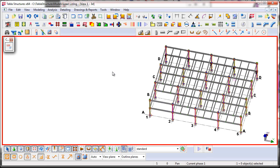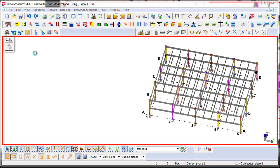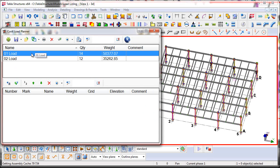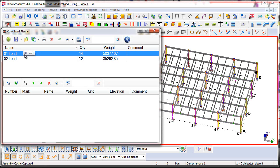We're now here back in the detailing version of the model, and the first step is that I'm going to load the Erector or Project Manager's load information back into the detailing model. So I'm going to launch the Connexload Planner tool, and before I've done that, I've copied the Connexloads.clf file that the Erector or Project Manager emailed me. I copied that in here to my detailing copy of the model, so that way I can see the loads.